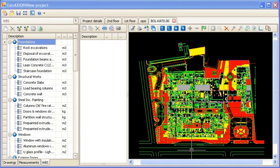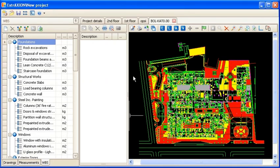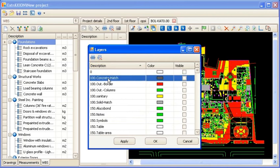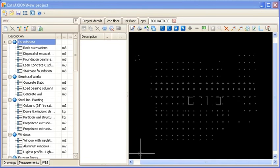You can also use group selection for fast large scale measurement. For example, you can measure concrete volume of building columns. First, open the drawing layers window and hide all layers using the appropriate button, activating only the one that is relevant in this measurement, in this case, the concrete hatch. Alternatively to the M button of the WBS tab, you can start a new measurement using the measurement buttons from the drawing toolbar.